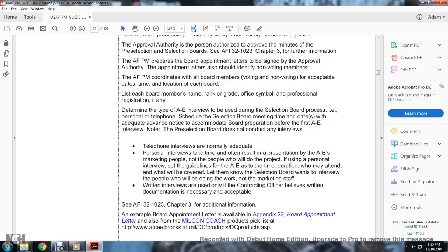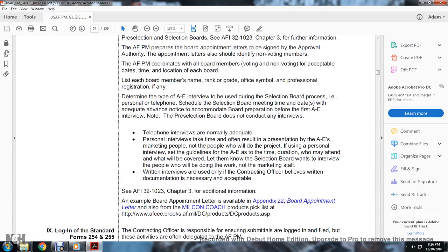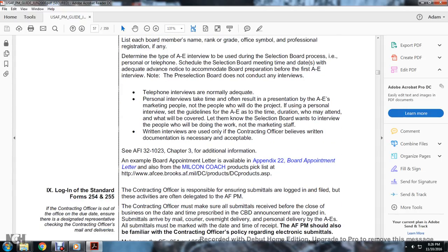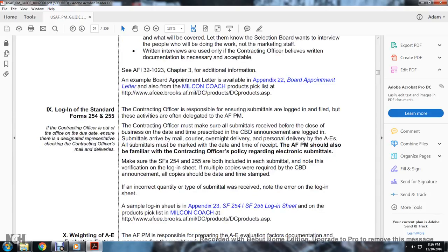Personal interviews often result in presentations by the A&E marketing people, not the people who will do the project. If using personal interviews, set guidelines for the A&E firms on the time and duration. Let them know that the selection board wants to interview the people who will be doing the work, not the marketing staff. Written interviews may be used if the contracting office believes the documentation is necessary and acceptable. AFI 32-1023, Chapter 3 has additional information, including an example of the board appointment letter in Appendix 22 and the Military Construction Contract Product List.